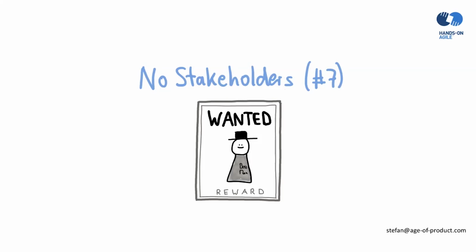Nevertheless, in my experience, you need to sell the sprint review to the organization, particularly at the beginning of a transformation, and it'll take time. If you're really fast and it's really quickly understood, it's probably 3 months. It's more likely to be 4 to 6 months until the stakeholders fully appreciate, embrace, and get involved in the sprint review. It just takes some time. Training, education, going back to them over and over again.